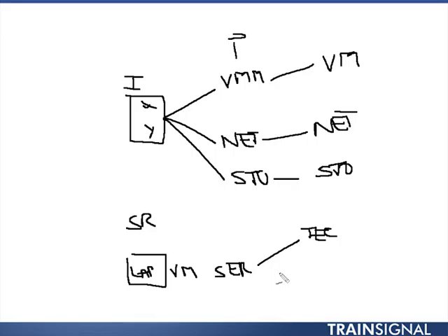You might have change controls. So for instance, back up to our example here, you have your incident ticket that got opened, that created problem tickets. Those were assigned, but now the technicians that are working on those tickets, before they can make changes, they might have to open what's known as a change request, which means, hey, my boss, I'm trying to make this change request on this particular system. I need approval. Can I do it? And I'm going to do it during this time. Someone has to approve this change request before that change request can happen.